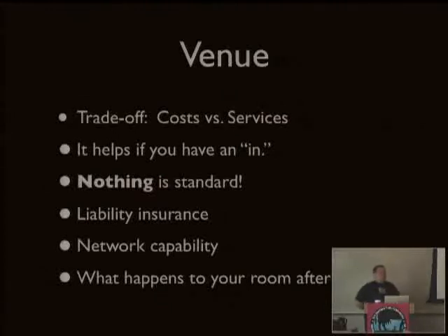Depending on where you're going, and what kind of relationship you have with your venue, they're probably going to require you to provide some sort of liability insurance to cover them in the event that something goes wrong with your event. This is one of the places where TPF can help you, because we carry a general liability insurance policy, and we can provide proof of insurance for you.